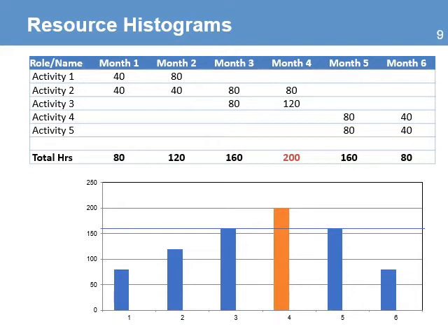For example, the total number of hours in a month is about 160 hours. Assigning more work to the same person will only create delays or poor quality in the deliverables. In the chart for month 4, a team member has been assigned up to 200 hours. If the average work is 40 hours per week or 160 hours per month, then there is no way that somebody can work more time than they are assigned, and that is a problem.